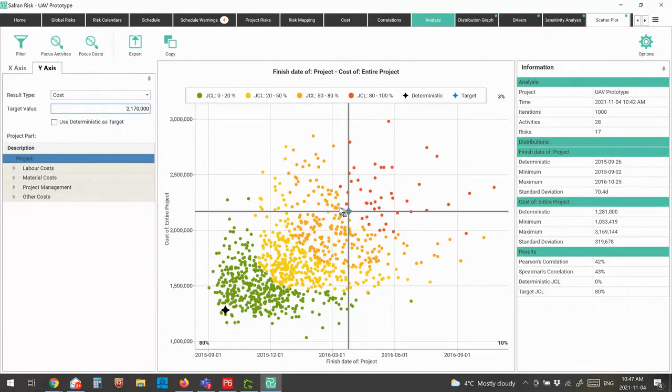But here's the thing, any of these points along that line will also give me an 80% confidence level. So let's say, for the sake of argument, that I'm not that worried about schedule. I'm much more worried about cost on this project. Well, I could choose this point down here, which would let the project slide out by about 6 weeks, but it would save me about $200,000.